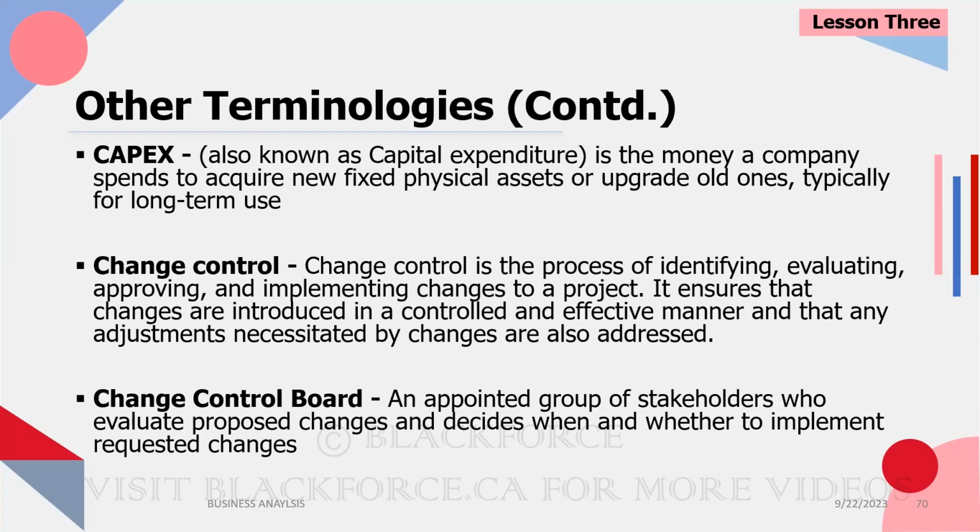Okay, tell them you take it away and you talk to the right people and you get back to them. And that's what you really want to do. And that's why we have a change control process, right? Because sometimes we get to a point where we even call it a change freeze, meaning it doesn't matter what you ask for, you're not getting it. We're at the point where we're stabilizing the solution.